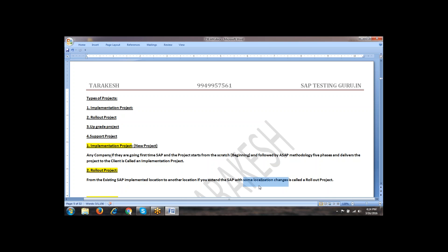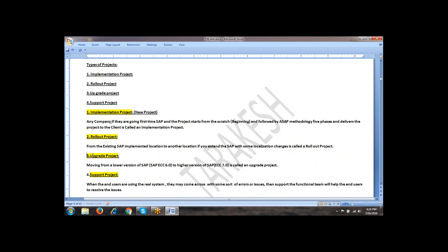It is a rollout. What is an upgrade project? In 2015, Tata Motors Indian location was implemented with SAP ECC 6 version. In 2016, they came up with a new version, for example ECC 7.1. So what they have to do is upgrade their software from a lower version of SAP to a higher version of SAP — that is, from ECC 6 to ECC 7.1. That is what we call an upgrade project.